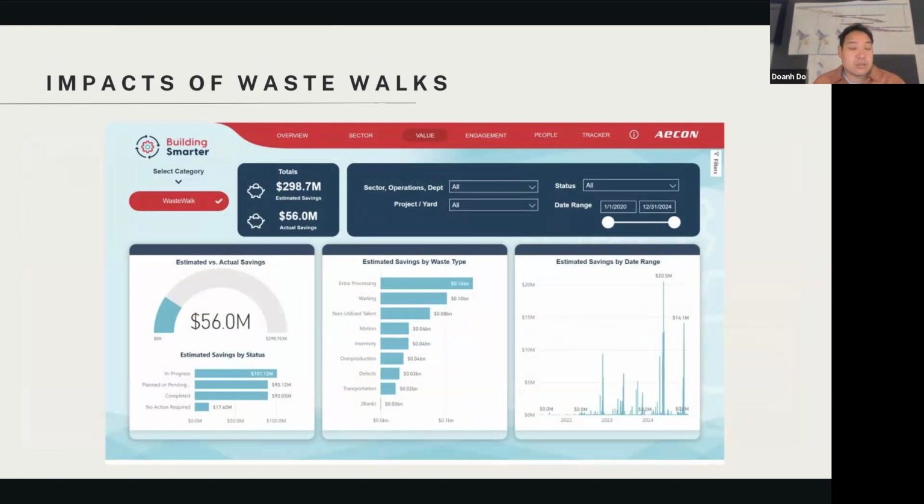So we don't teach Kaizen first. We teach it after you have stable last planner and stable TAKT, because from there, your Kaizen doesn't actually interfere with the work. It makes it better. Otherwise, what we see with people is that they do random Kaizens to where it may look like it's improving, but it's not improving. So we want to first create that consistent framework first.